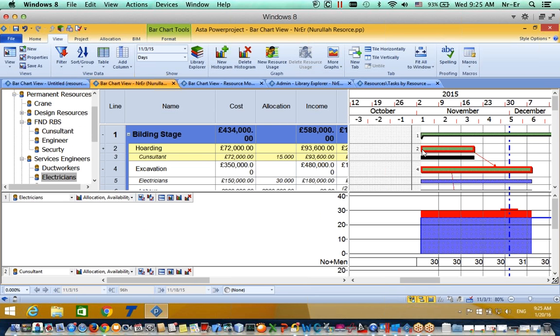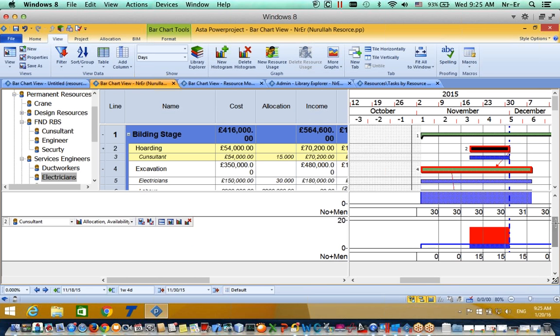And let's get back to the histogram part. I think you realize that when I move my activity, directly in here my histogram is changing. For example, if something happened on the project and I decided to postpone my activities by 1 or 2 weeks, I am just going there and postponing my activities a few weeks, and as you see, directly it is moving in the histogram as well.